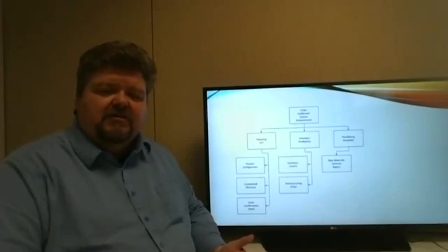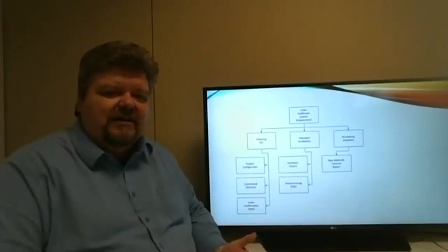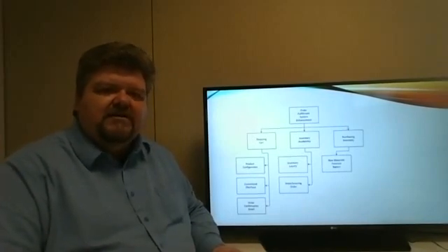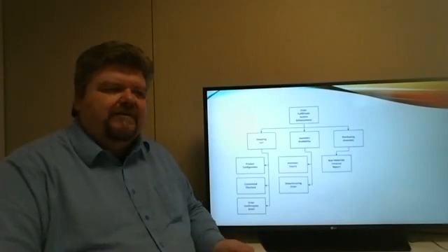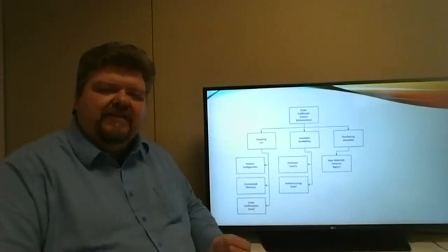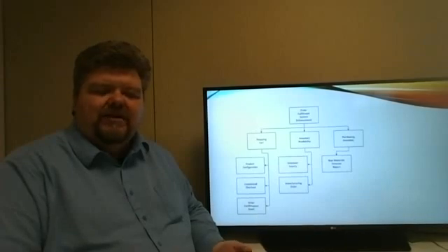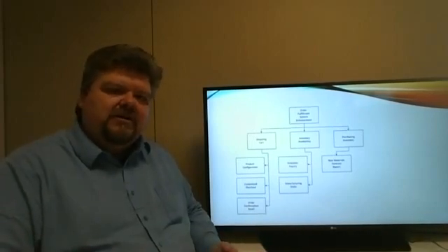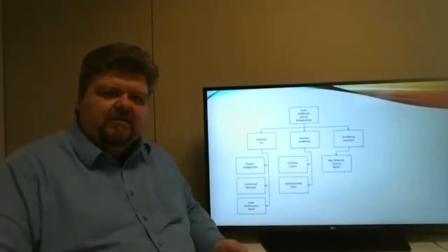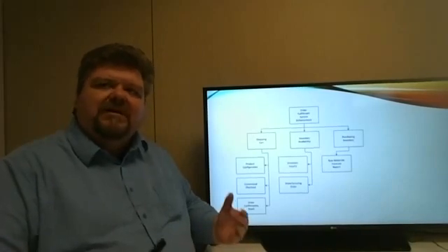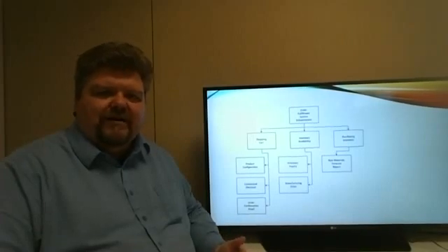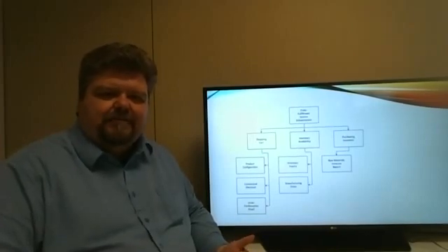The first is the functional decomposition, or a functional decomp. Functional decomp can be done on either a features basis or a work basis. On a features basis, you would take a particular feature, function, or process within your organization, break that down to its highest component features, then break each one of those components down to lower level components within those components. Break those down even to lower levels. You can usually do 2 to 4 levels within a functional decomp.